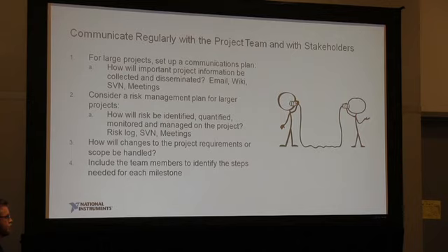I think about, we get to the end of a project a lot of times, and there's a hero's effort to work tons of hours, weekends, to try and meet that end milestone date, project date. If we can have that kind of intensity and focus at each of the interim milestones, conceptual design, detail design, fabrication, software, you spread that out.